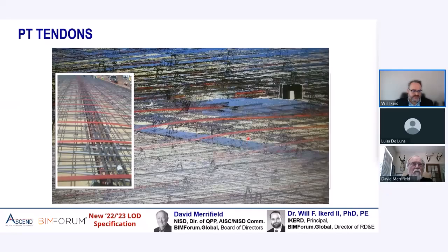So the specification that you'll find with BIMform Global gives you an easy framework to identify tolerances, both horizontal and vertical, in your specification. It can be done in one table per item, and then it references over an LOD that ties into the BIMform Global LOD specification.